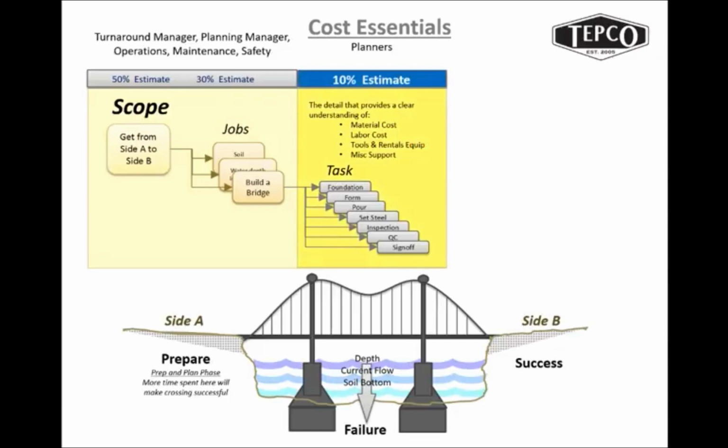But once this is done and it's been validated, everything's signed off, I can give you a plus or minus 10% on what it's going to take to put the bridge up. If we also added the soil, the water, I could give you a plus or minus 10% on the entire scope of work that has to be done. So this is the foundation and the basis for a lot of different things.